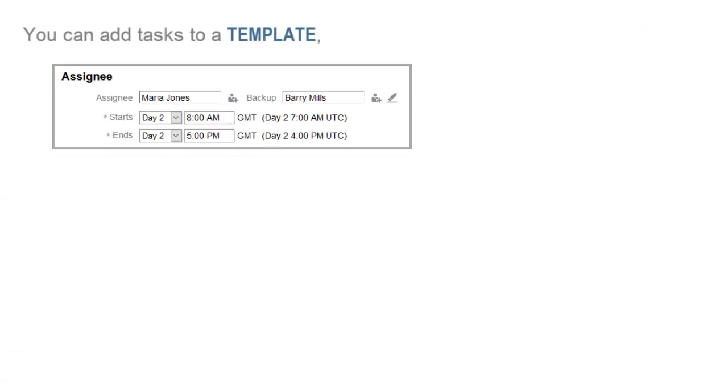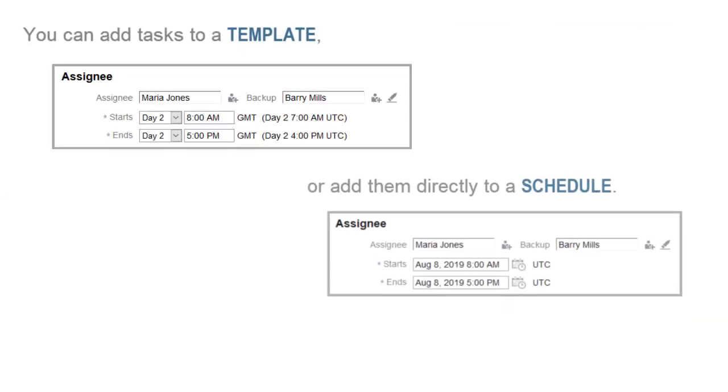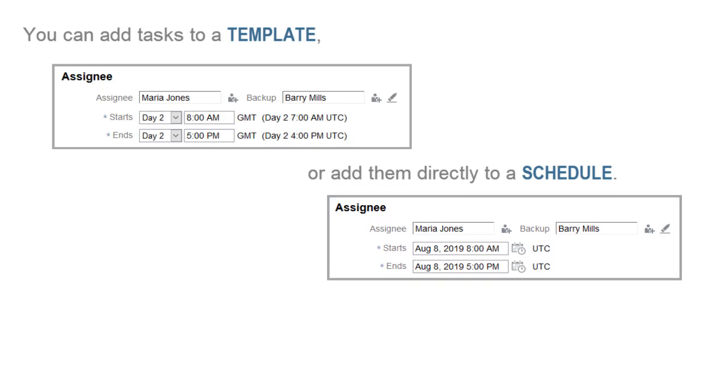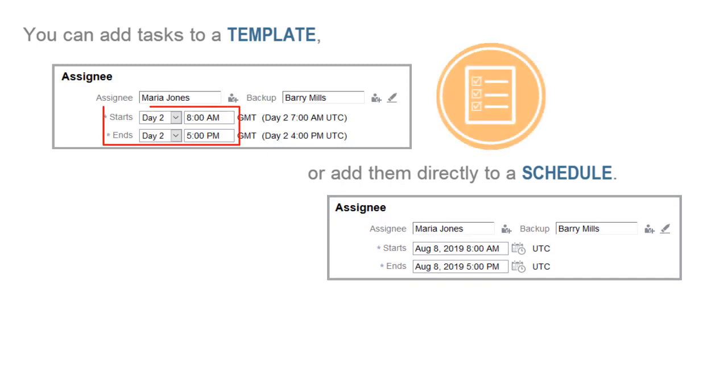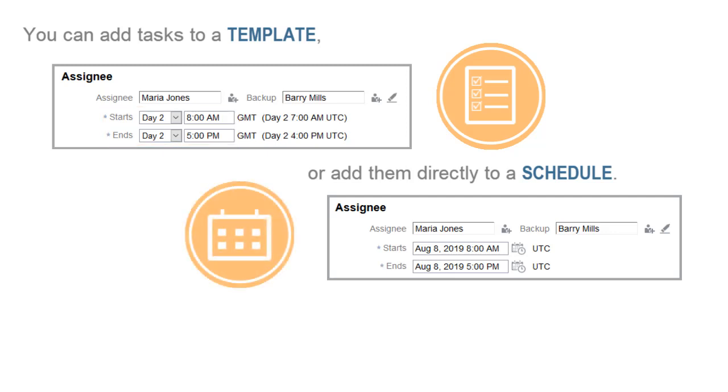You can add tasks to a template, or add them directly to a schedule. When you add tasks to a template, you specify the start and end days as the number of days before Day 0. When you add tasks to a schedule, you select calendar dates for the start and end days.